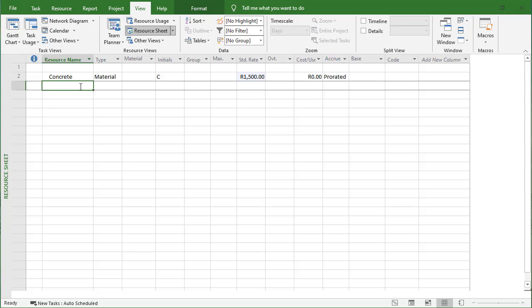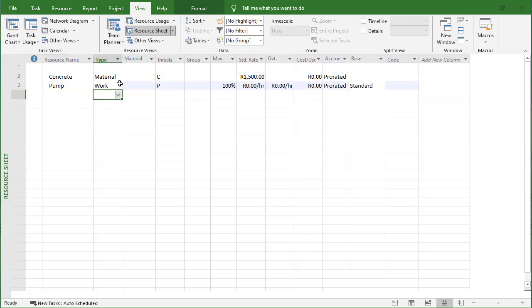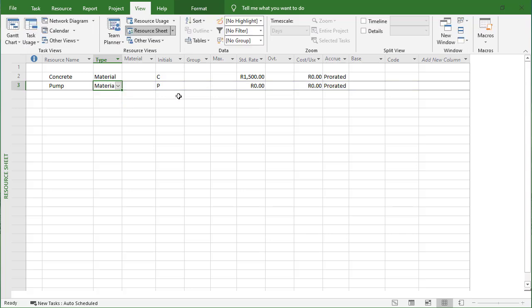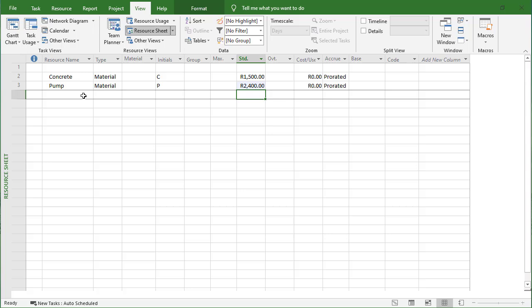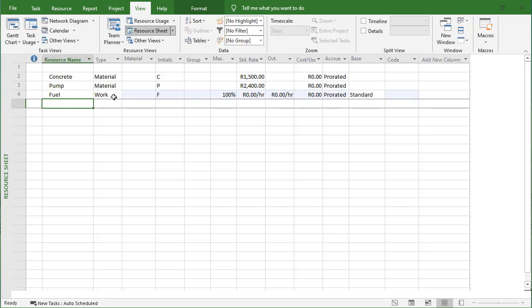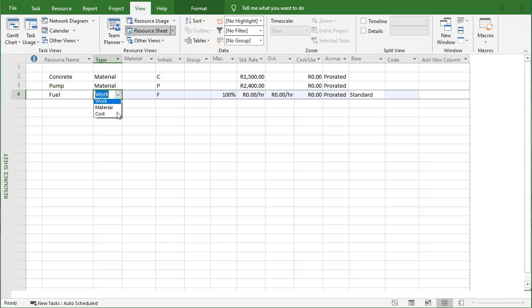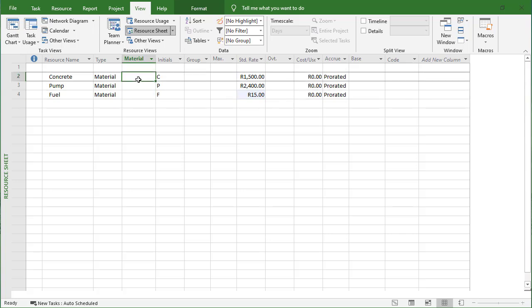Let's put in a pump as well - that's going to be a material resource at 2400 rand per day. Let's also add some fuel for that pump, also a material resource, and that's going to be 15 rand a liter.